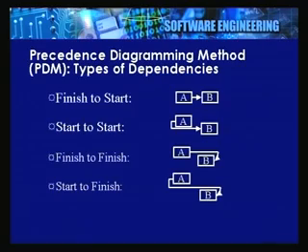What it means is many tasks must end simultaneously together in that particular sense. The fourth kind of relationship is start to finish, which is more difficult to observe, where we say that the preceding task A cannot finish until the succeeding task B has started.